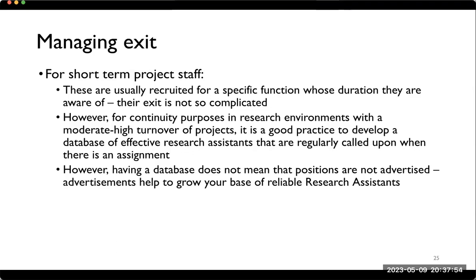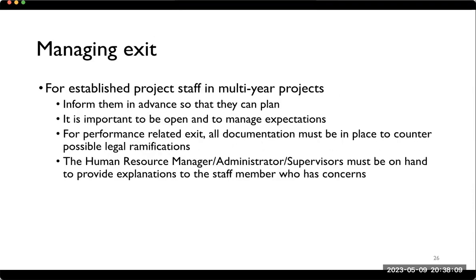If there are any deliverables, they hand over those deliverables to their supervisors, and then you sign them off. If there's any payment which is due, make that payment, and then demobilize those staff.